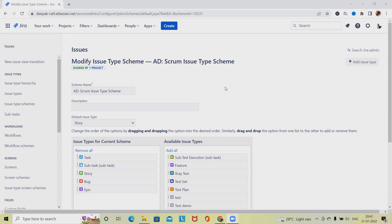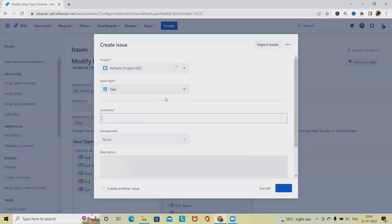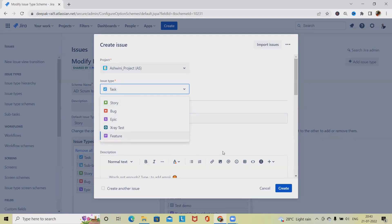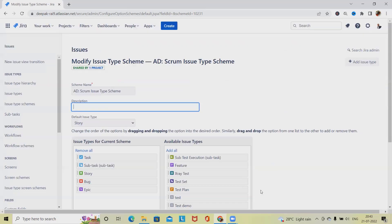Initiative is also an issue type in Jira. If we click on Create, we'll see these issue types in the list. If we want to add Initiative to this list, then we have to go to the admin portal and customize that.